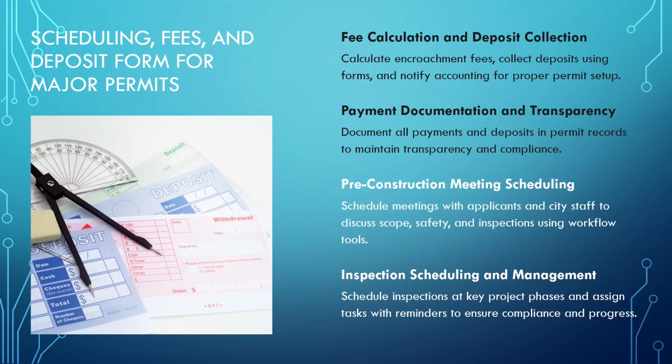Inspections should be scheduled for key stages such as trenching, backfill, paving, and final restoration. Assign inspection tasks to the appropriate staff and set reminders. Financial handling is another critical component. Calculate encroachment permit fees according to the city's fee schedule.